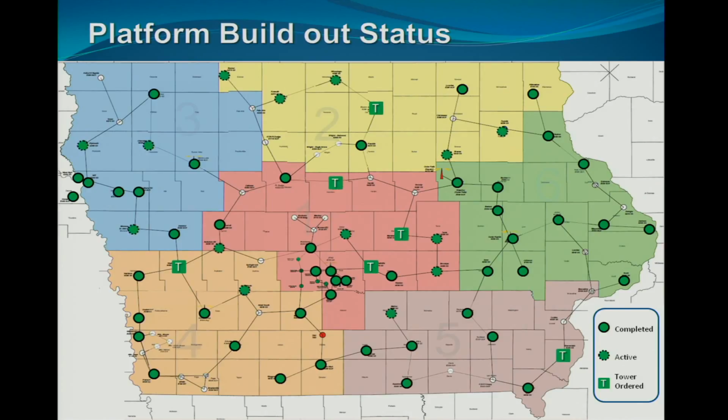So when that's designed, the tower manufacturer sends us a template that's used to mark where the bolts go into the concrete and the footings. We need to get those bolts in so that when we do the drilling, the concrete has to go in the same day as the drilling, and then we put in these bolts, about 4 or 5 feet tall, really thick, that hold the tower structure in place. So it's really a big puzzle. We're always trying to get everything to fit together.